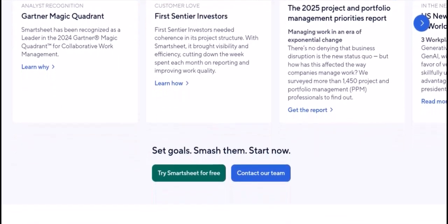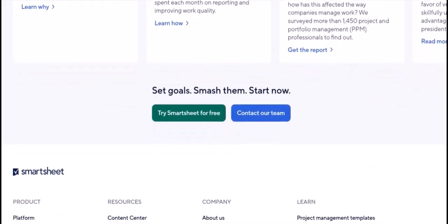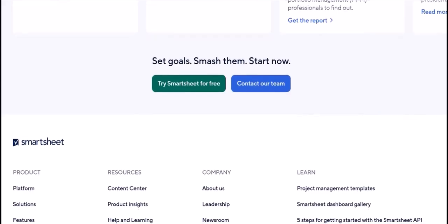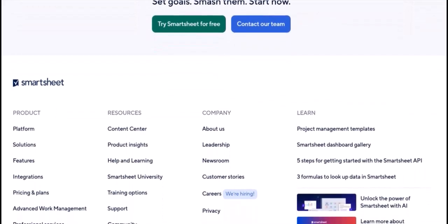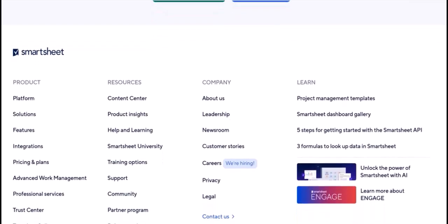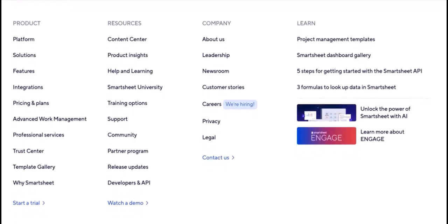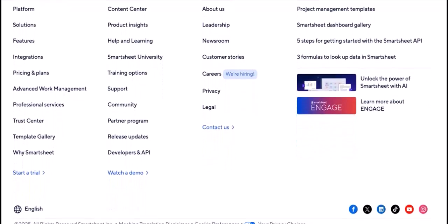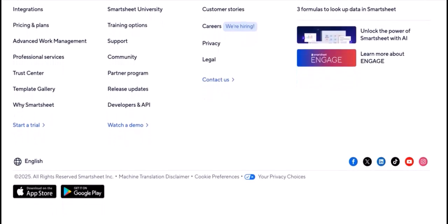Quick customization. You can easily zoom in or out on the timeline using the controls at the top of the chart to view days, weeks, months, or years. Drag the edge of a taskbar to quickly change its end date and update the duration in the grid. Click and drag a taskbar to move the entire task forward or backward on the timeline. Double-click a taskbar to open the Edit Row window for detailed adjustments.